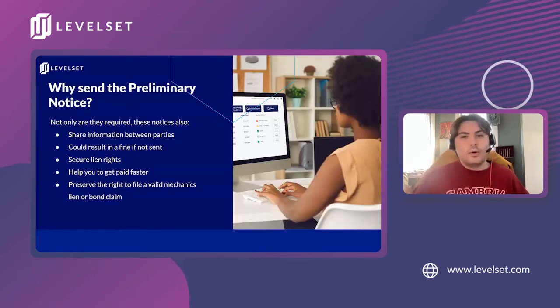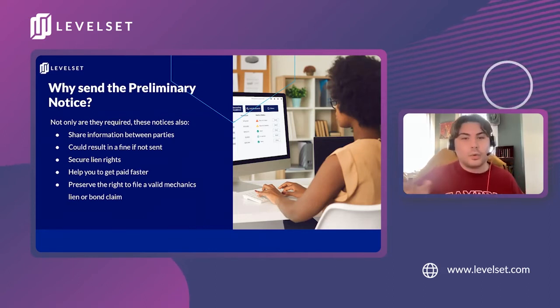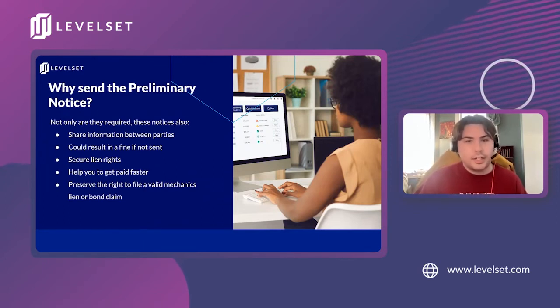While we've been talking about the definition of what the prelim does, you're probably thinking, why should I send this? This is typically a visibility document. It's primarily meant to share information with people up and down the chain on your project. It lets other people know that you're here on this job, this is what you're doing on the site, and this is how to get a hold of you if they need anything from you. Basically, it's a way to ensure that the project runs smoothly because it creates clear lines of communication. But it's important to remember that they are required documents as well. In fact, failure to send a prelim in California is grounds for disciplinary action under the Contractors state license law. According to California Civil Code, the preliminary notice is only optional if the work is less than $400.